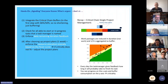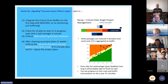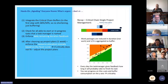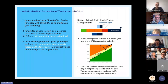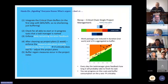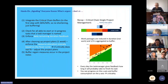The day-to-day resource allocation is done stoically by the fever curve. If two people come to you as task manager and both want resources, you go to the fever curves and the one with the red project wins. If the other says 'my project is even more critical,' he just has to go back, clean up the plan, and if he's then more red than the other, he gets the resource. This mechanism drives the project plans to be cleaned up.